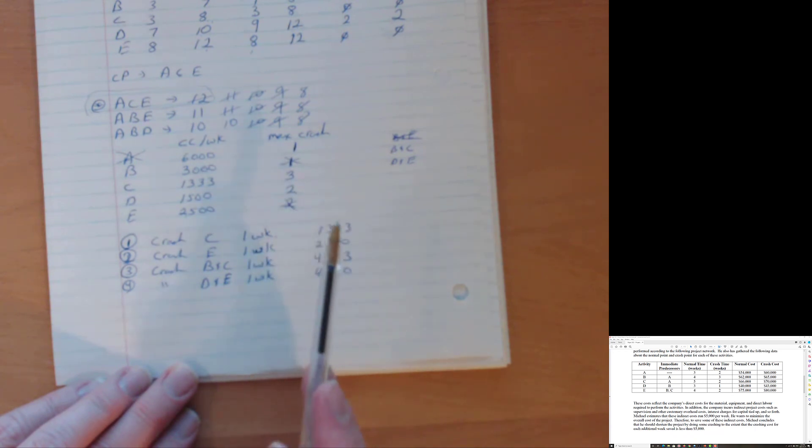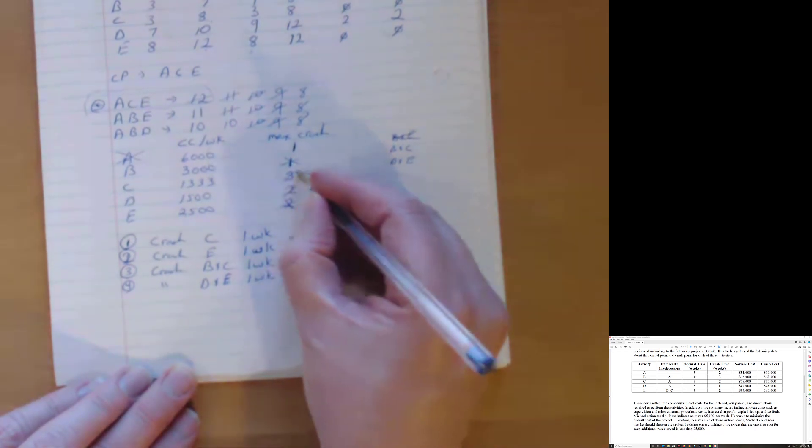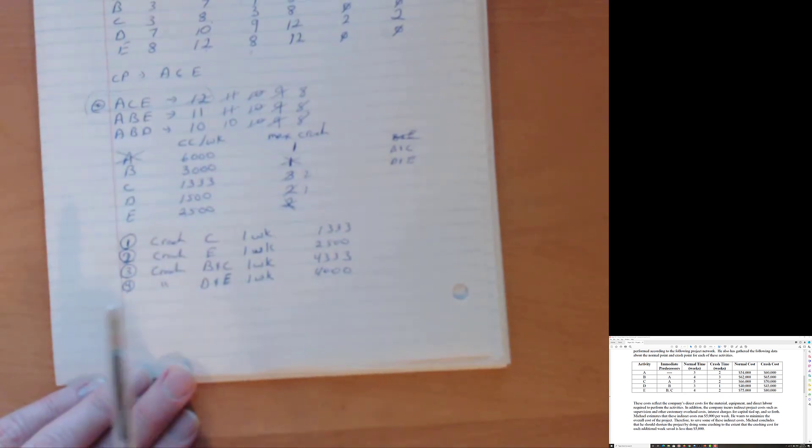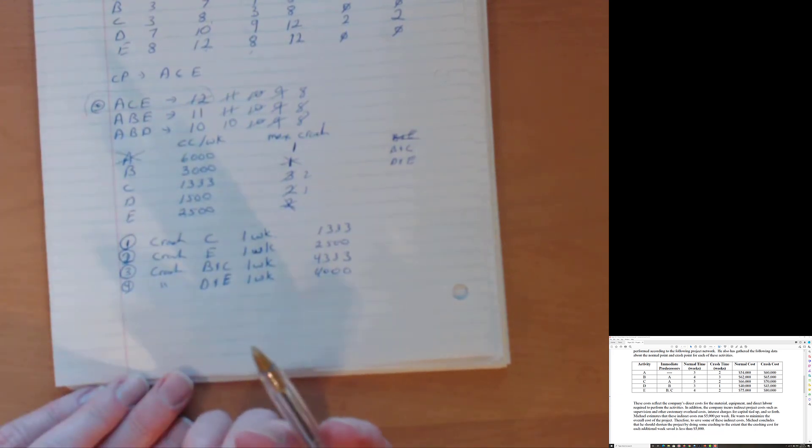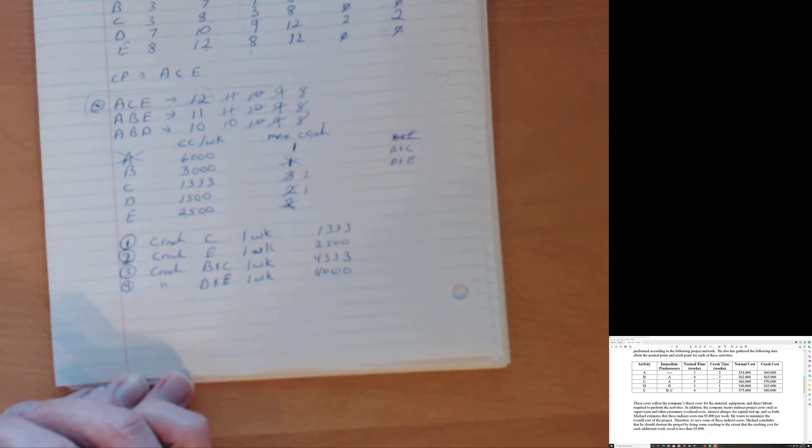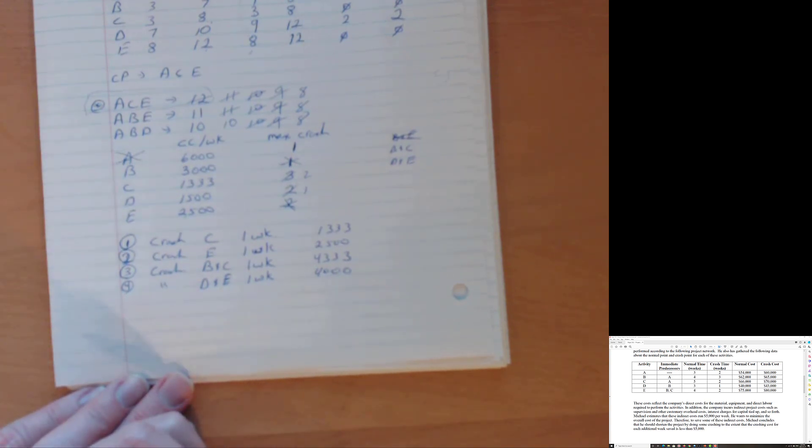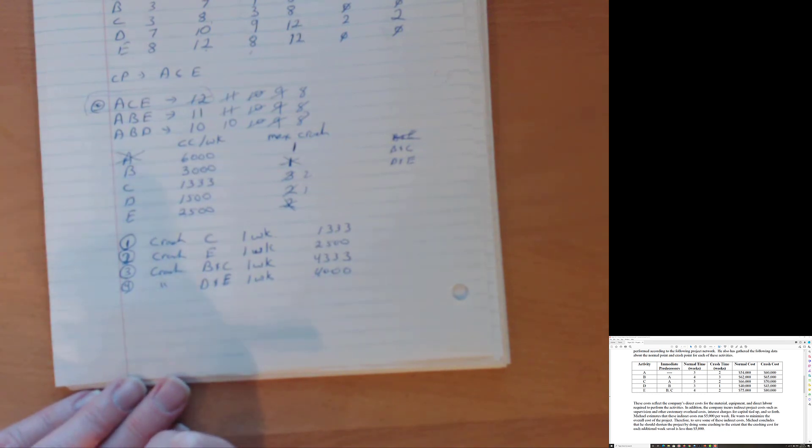So E is finished. D, I could do another week of D. I could do another two weeks of C, but I can't, in a combination of C and D, I can't crash all three paths because this A, B and E is pretty much maxed out. A, B and E cannot be efficiently crashed anymore. A, we can crash it, but it would cost, we'd spend $6,000 to get $5,000. B and E are done. They're capped out. So that one pathway can't be reduced any further, at least not without losing money. And so now we're pretty much stopped.